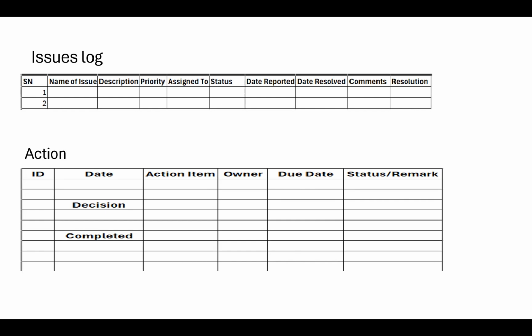As the project has started, we now have internet failure. Having internet failure at this point in the project is no longer a risk, it is now an issue. Is that clear? So a risk that manifests into a problem in the project is now an issue.